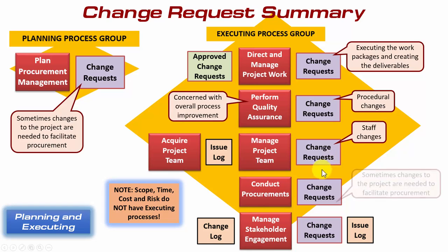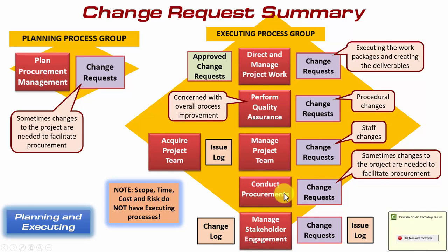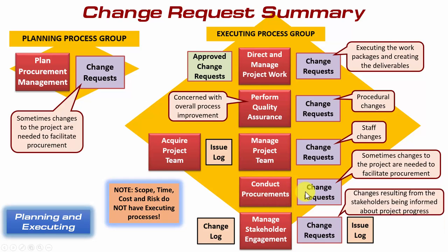If you're using procurements within your project, as a result of the process conduct procurements, very similar to planning them in the first place, sometimes changes to the project are needed in order to facilitate procurement. Remember that this process is where the bid package is issued to potential sellers, bidder conferences are held, and the evaluation of proposals from potential sellers is considered in order for you to select one of them. And as you might imagine, in carrying those activities out, it's highly likely that some form of change request may need to be raised. Which brings us to the process, manage stakeholder engagement.